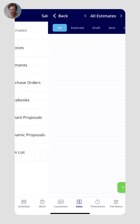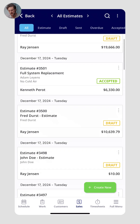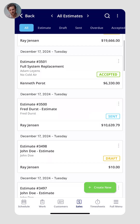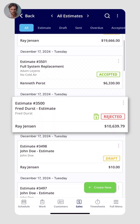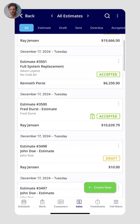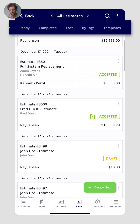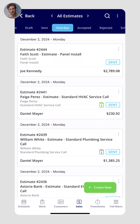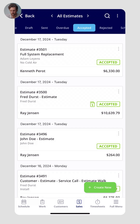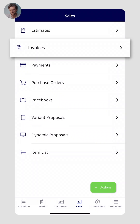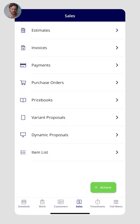Estimates are sent to your customer — they might also be called a bid or a quote. You'd send these to your customers and they either reject them or accept them. When accepted, you know they want to do business with you, and then you go ahead and create that as an invoice. Eventually you'll collect payment on that invoice. You can easily view estimates by status, including overdue estimates, since you can assign an expiration date, or see all the ones recently accepted. Invoices are very similar to estimates and are most frequently converted from an estimate.